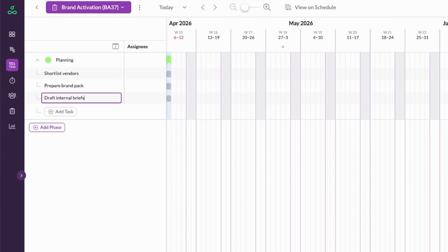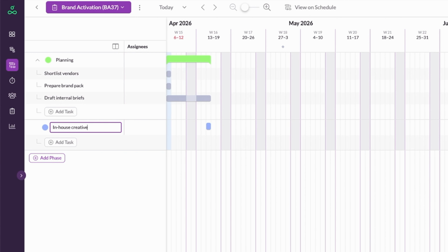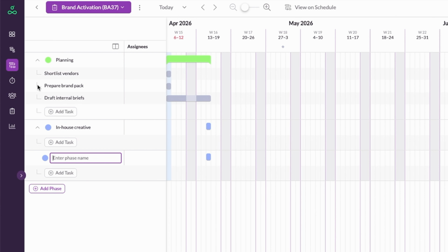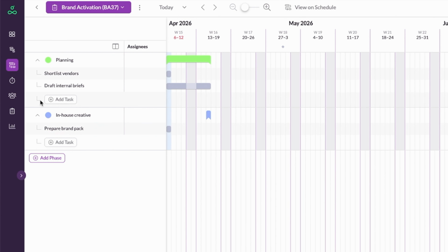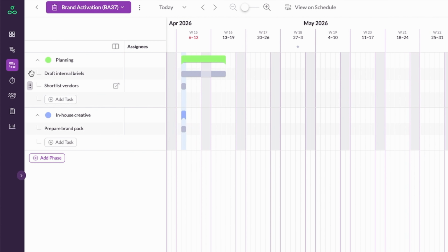If the task will take longer than a day, or if, for any reason, the timeline needs to shift, you can simply extend the task by dragging it. And if that affects the length of the phase it's associated with, the phase will extend to match, like so. You can also drag tasks between phases and rearrange tasks within a phase.